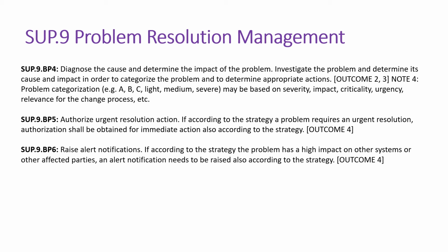So that's when you need to categorize all the problems that require urgent resolution, and solve all those urgent resolution categorized problems on a need basis. You need to define a strategy to address all the urgent resolution items, and you need to authorize each and every issue. You need to record who is the identifier of that particular problem, and also who is responsible for the resolution of it as well.